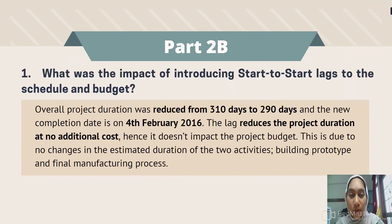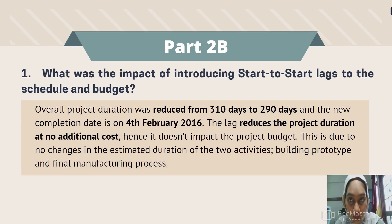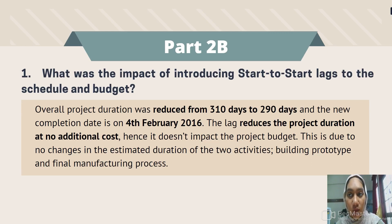Hi, I'm Marjana, and I will explain the questions in Part 2b of the Red Zuma project. Regarding the resource-constrained schedule, which top management is not happy about, the ABC president has authorized the first Saturday of each month as a working day. On top of that, we collectively agreed to start two tasks — building prototypes and final manufacturing — ahead of their actual start dates.